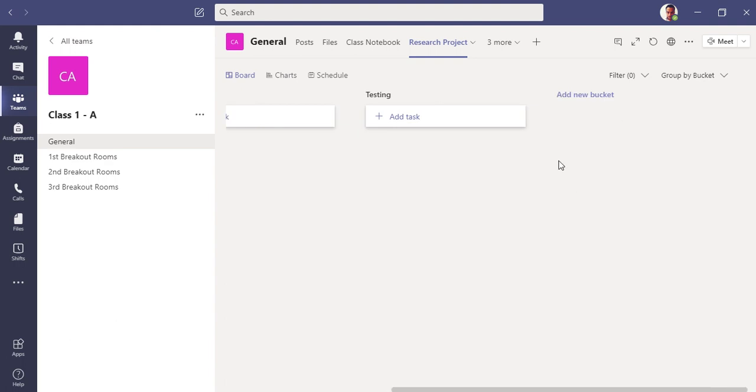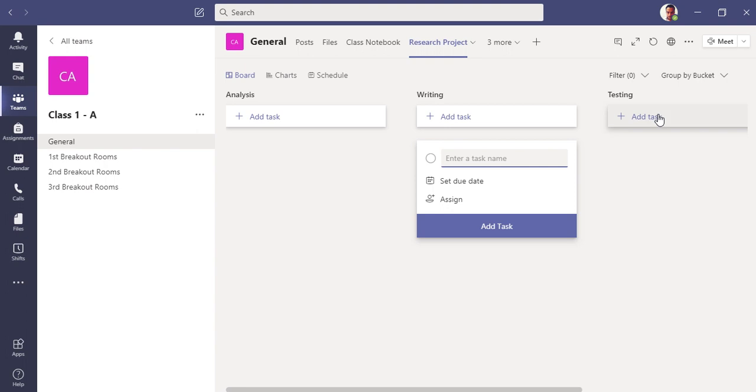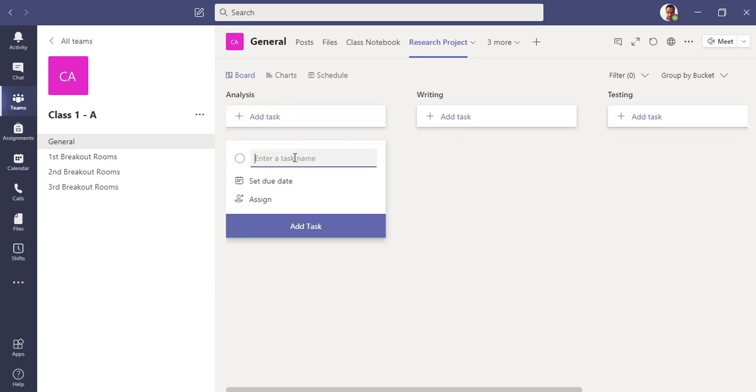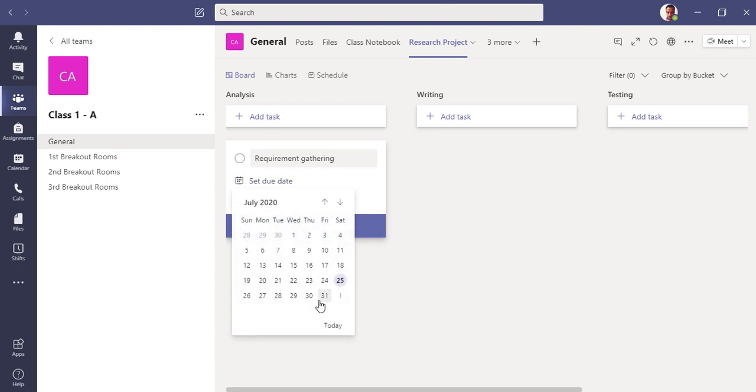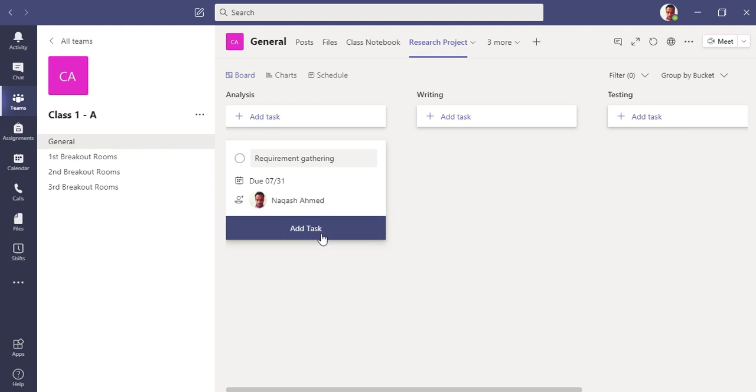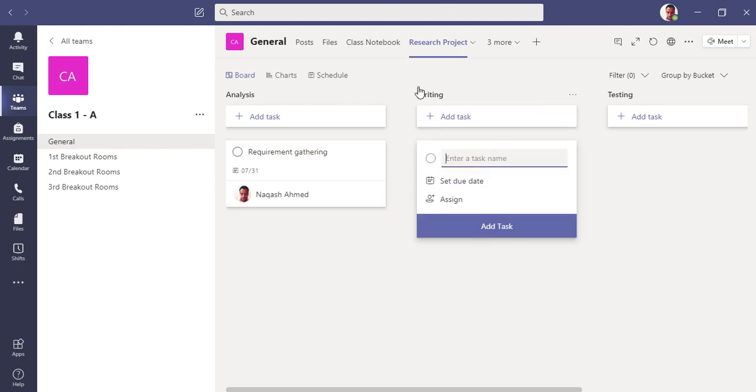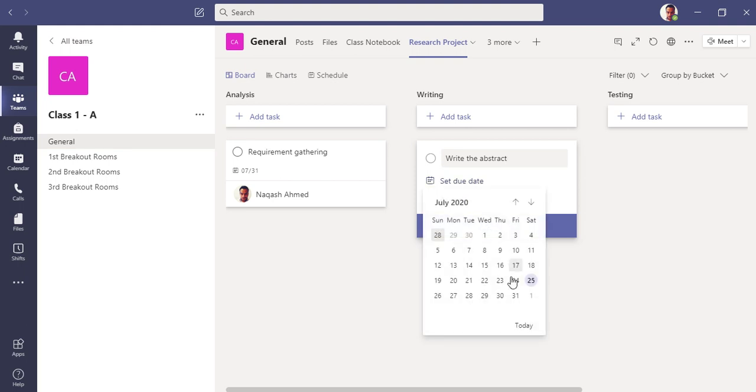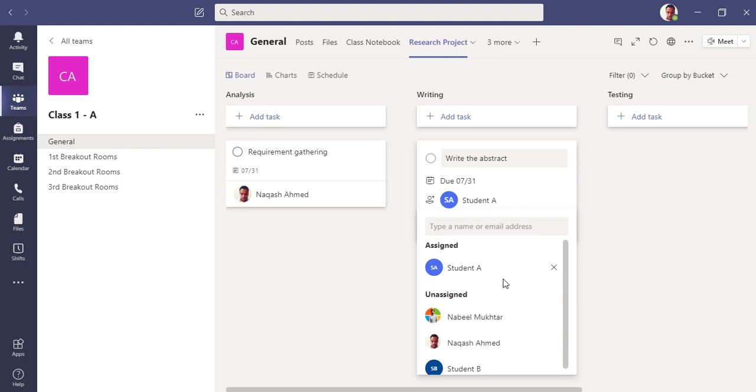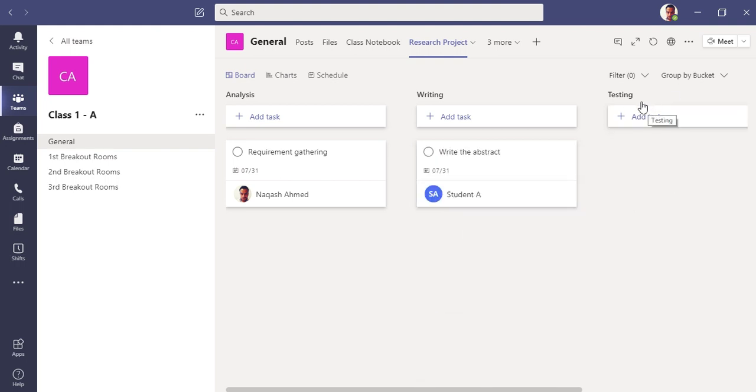These are my three buckets which I've added. Now in each bucket you have the option to add tasks and assign them. Let me add a task here. Let me set the due date till 31st and assign it to myself. Click add task. This task has been added with the due date and assignee. You can do the same thing in the Writing bucket, add the due date, assign it to Student A, and similarly in the Testing phase as well.